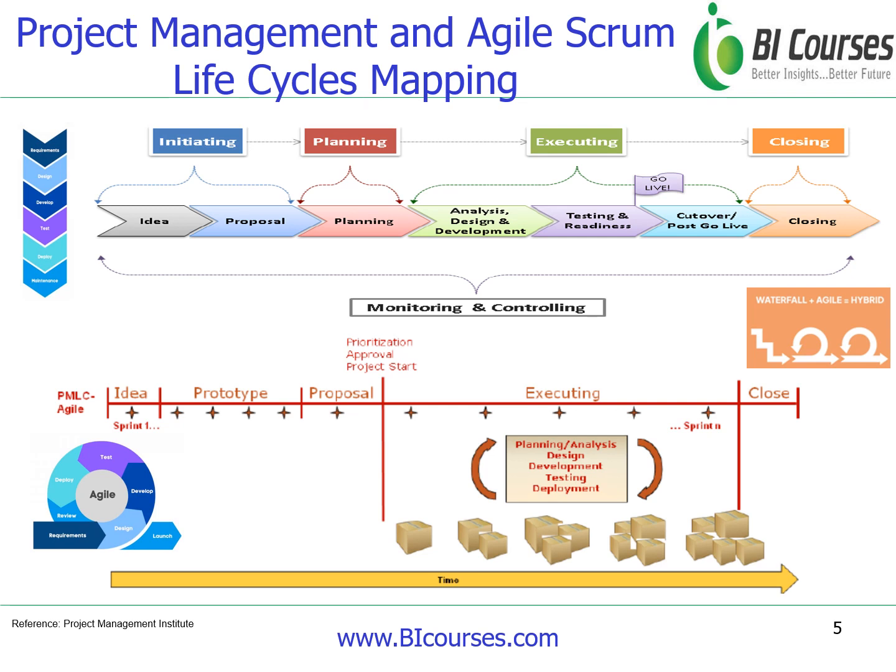Let's explore how the project management phases align with the IT development lifecycle. Initiation phase. In this one, it's all about business needs and stakeholders. So no IT development lifecycle activities really occur in this phase. Second, planning. It's about creating a detailed plan. In this phase, you will notice requirements gathering and high-level system design activities from the IT development lifecycle.